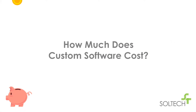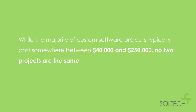How much does custom software cost? That's a great question, and it's a tough question to answer, because it depends. While no two software projects are the same, in our experience, the majority of custom software projects fall somewhere between $40,000 and $250,000 to design and develop.